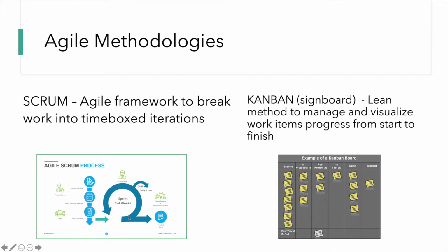A sprint can typically be between 1 to 4 weeks, and it's an iteration and it keeps cycling. Once the first sprint is complete, then the next sprint will start. When a particular sprint is completed, the team members will showcase the work that they have done. Finished work will be showcased in a sprint review meeting, and then there will be a sprint retrospective where they will discuss what went wrong or what went well and prepare a development plan for the next sprint.